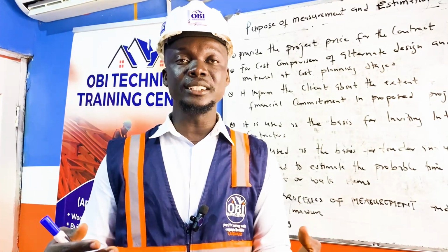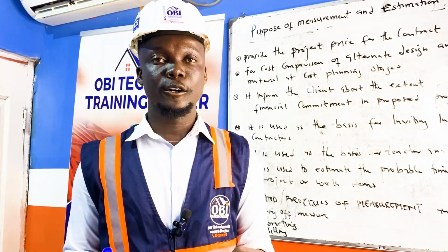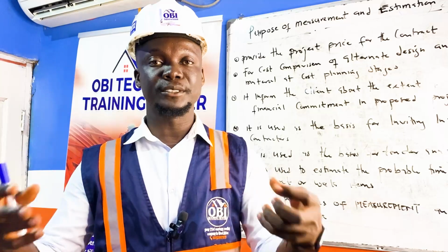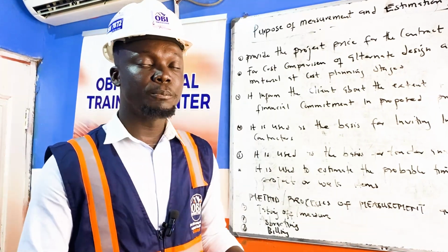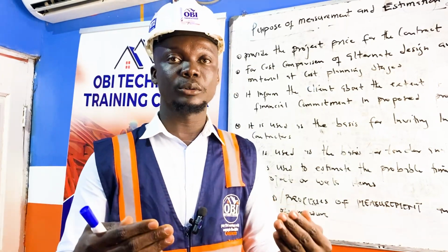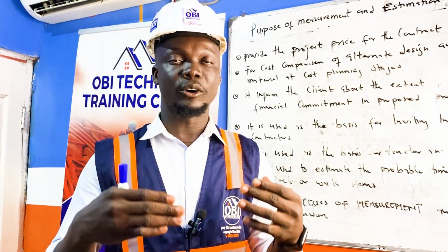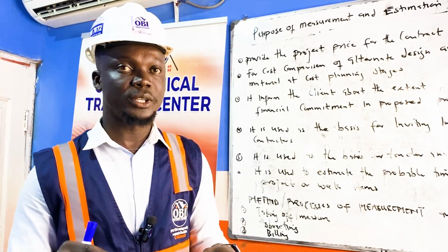A taking off means that we need to pick dimensions from working drawings, or we have to pick dimensions from specification given by the client or the client consultant. So when you pick these dimensions from the drawing, you get the actual quantities or the actual measurement that you need for the particular job they are going to execute.